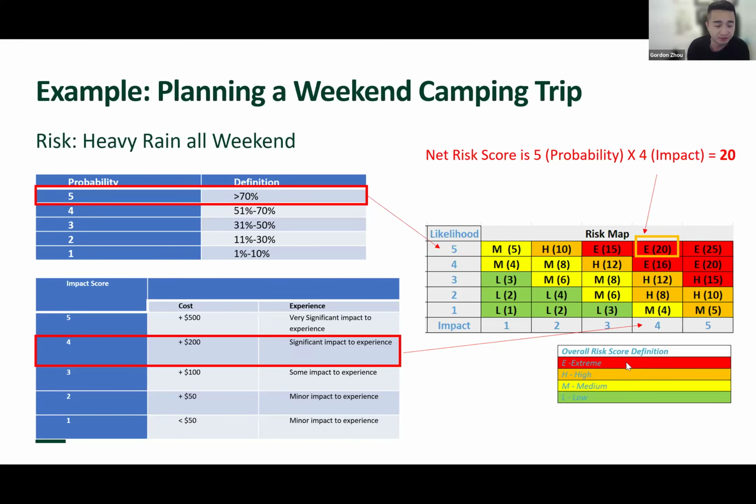Oh my gosh, if we leave the food out, it'll attract wildlife. What is the probability of that? What's the impact of that? So you go through, you identify all the things that could go wrong or threats, and you analyze it using this. And then every risk gets a score. And then you can say, okay, these ones are higher, let's focus our attention on those. These risks are lower, maybe we'll keep that on the back burner. We'll deal with that after, right? So hopefully this is a tool to help you think about risks in a structured way.